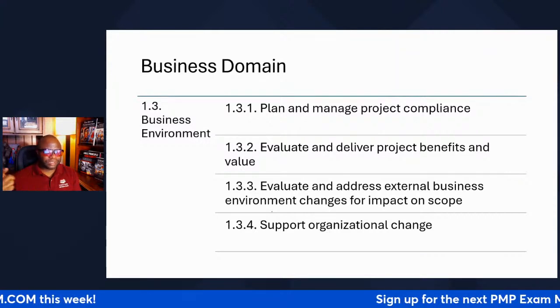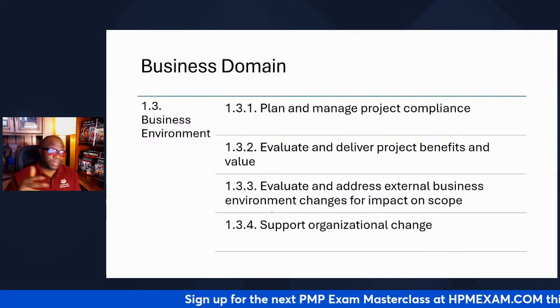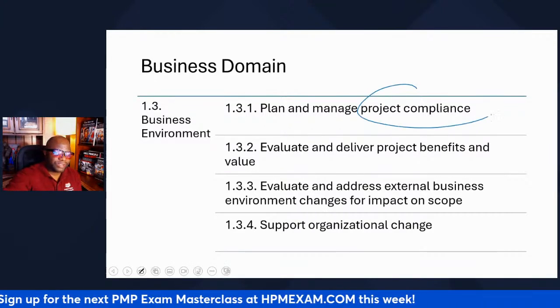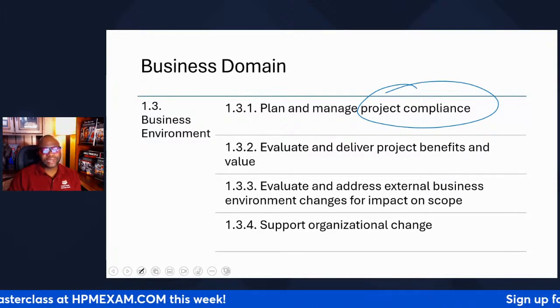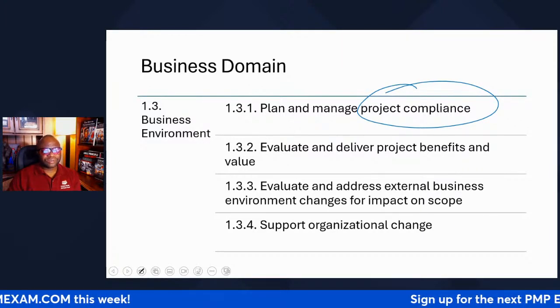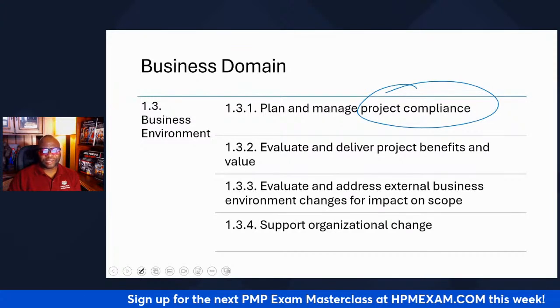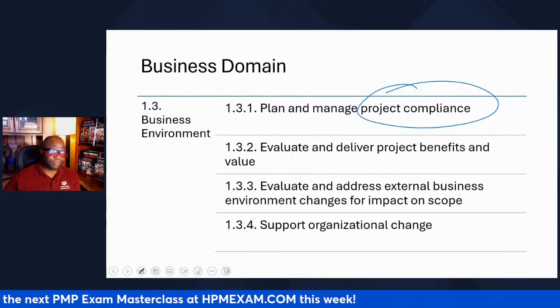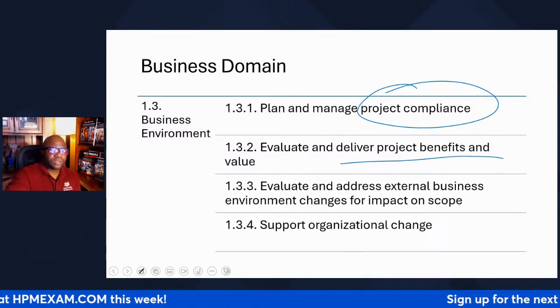Americans with Disability Act, HIPAA compliance, PCI compliance, and we could go on and on. So you as a project manager, you better have that down pat, PMI is saying. And in the world of Agile, our compliance items, those can be part of our definition of done. So because you're working in an Agile environment doesn't negate you upholding compliance. Just remember that. Evaluate and deliver project benefits and value is the next one.